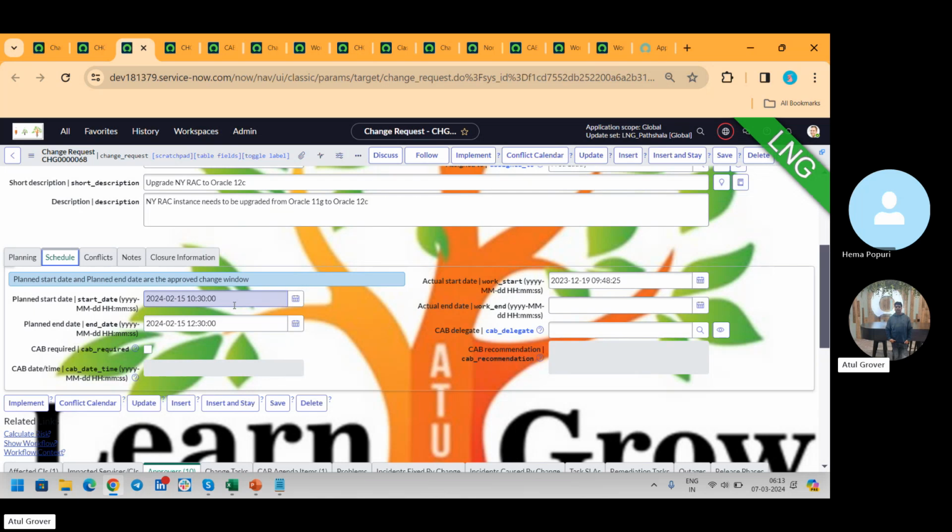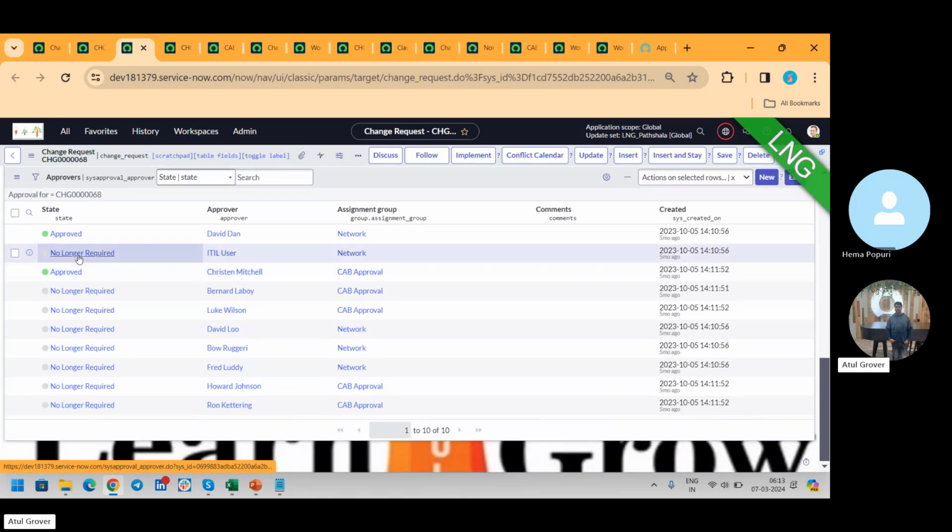So change is something like your practical life only. That is why it is said that if anybody wants to make any changes once it has been approved, you have to revert to the new state and then make the change, because the people who already approved should also know what change has been made. That is another reason it is a complicated process, because once a change gets rejected, it means everybody needs to approve the change again. A lot of times people ask the committee, hey, I want to bypass it, but it's not a best practice.